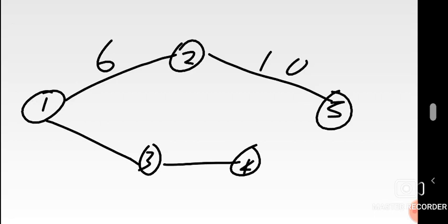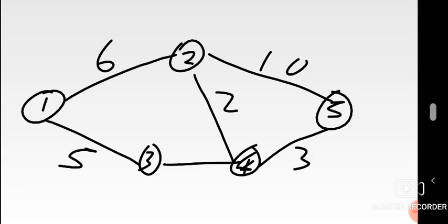So there's supposed to be a 4 there, and of course there was a 2 there, and a 3 here. Then we are interested in the activity up there. Actually, this activity just here, let me put the other numbers there. Okay, we're interested in 2 to 5. It's on the critical path. Start crashing it as well. The crash limit on that activity was what? 5, meaning that you have to stop when it reaches 5 days.